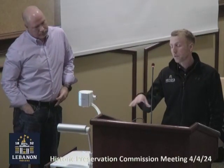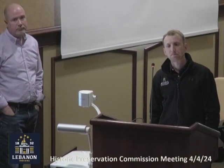My plan is I need to get the COA tonight, hopefully, and then I will go in front of the state and get permits, go in front of the grant committee would be my next step to find out what monetarily we're going to look at. Once I have that news, I will set my construction schedule. But I don't want to say anything now because I want to know what the financials are before. Is that the RDC? Is that where? I think that's right.